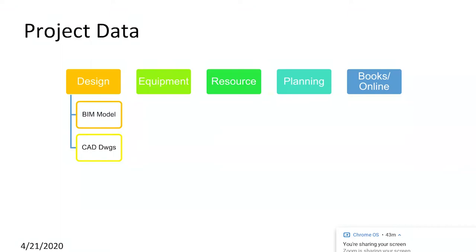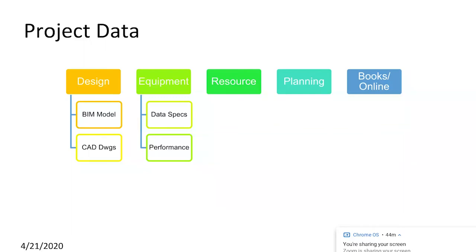The next phase covers equipment and mechanical tools required to complete the project. Equipment-related data includes specifications and how to procure those tools, and their performance and efficiency. Decisions on equipment can be informed by previous projects — for example, if excavation costs were excessive on a prior job, for the future project you could issue a tender to multiple parties to find the most cost-efficient contractor.